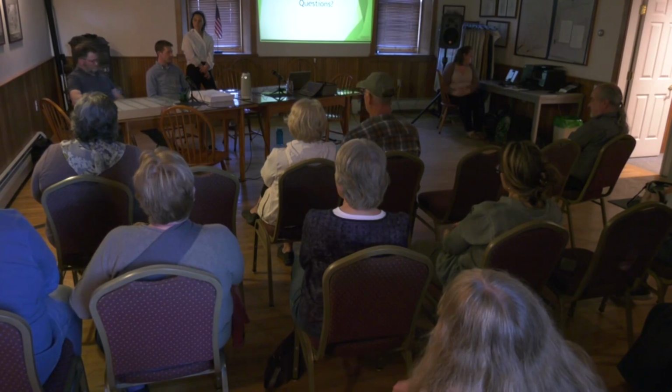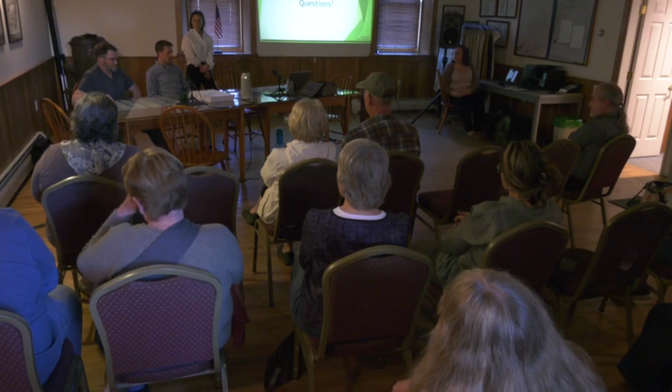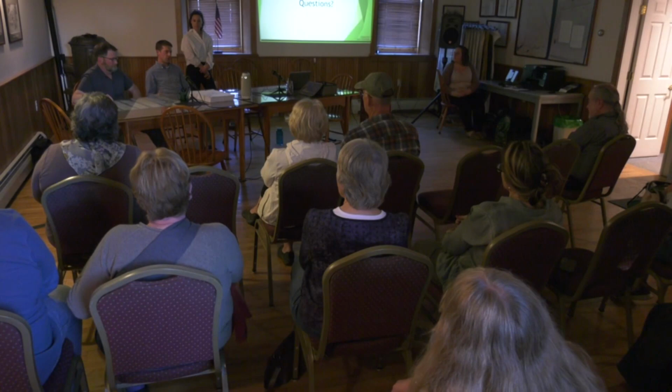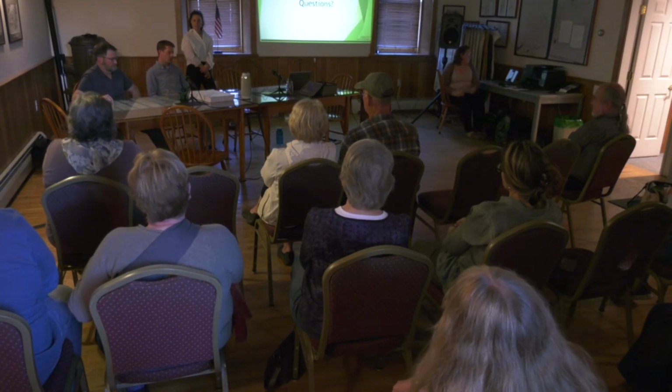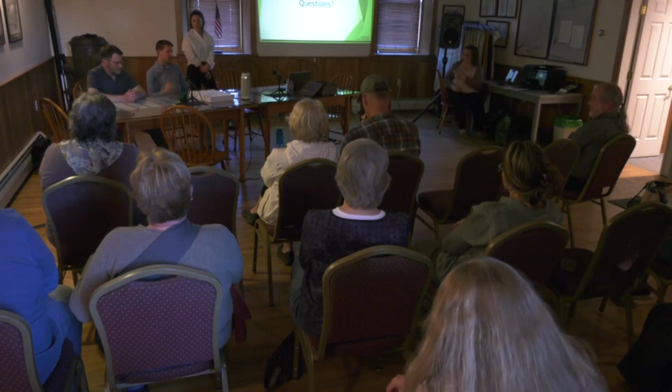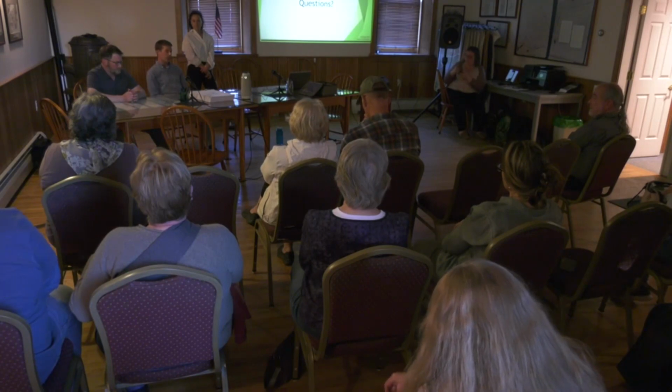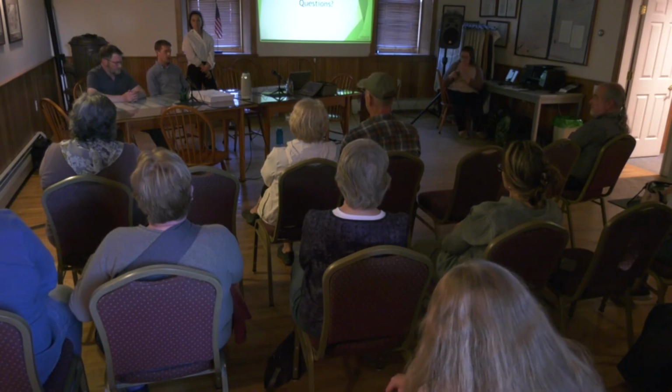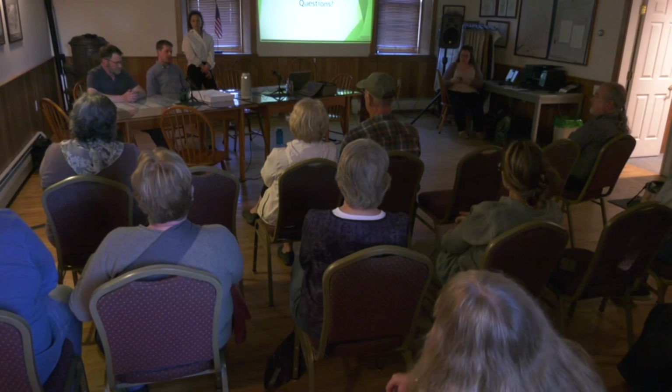So I think if the town really desires, or the public really desires, to have a signal or an intersection project for 2 and 15, the best way to do that would probably be to interact with the RPC. The RPC knows our scoping and our asset management folks, and they can essentially program a project or put a project in the queue to be prioritized, and it could be a standalone signal project. As soon as you put a signal project in a paving job, it won't be paid for 15 years because you're dealing with right-of-way and permitting.